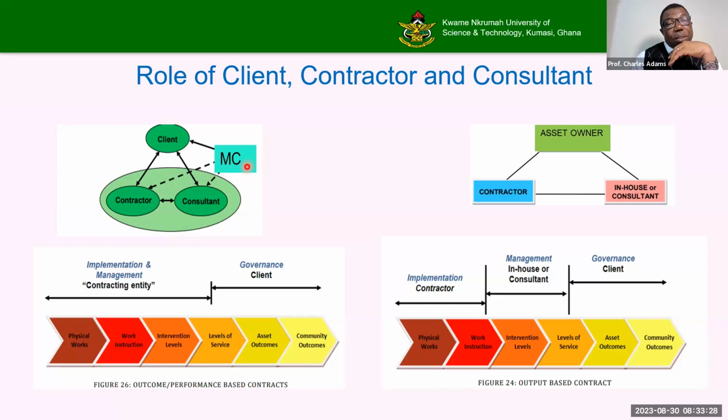the monitoring consultant. This is not a traditional consultant. His job is about 15% of the normal consultant who supervises the job. And therefore, there's a lot of confusion. What is he supposed to do? Sometimes he lets people there, they don't do anything. Then he doesn't have enough time to do it. He says, I need more time to do design review. It's not your job to do the design. So you must have a careful way of reviewing the design in 14 days. That's why they don't give you enough time.